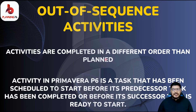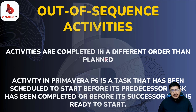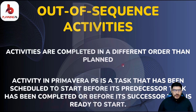Basically, for example, there are three activities: A, B, C — or one, two, three. Activity one is completed on time, but by skipping activity two, you start activity three. So activity two, or B, is now the out-of-sequence activity. The third definition is simply that activities are completed in a different order than planned.